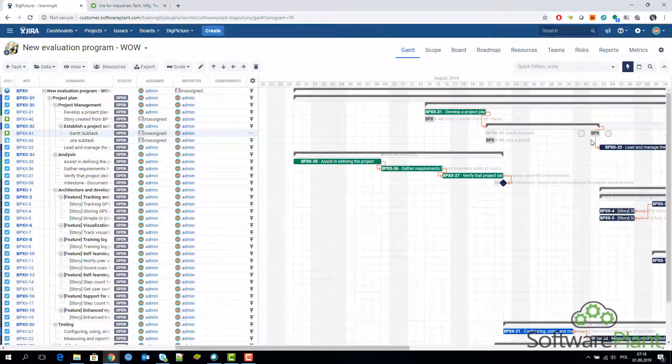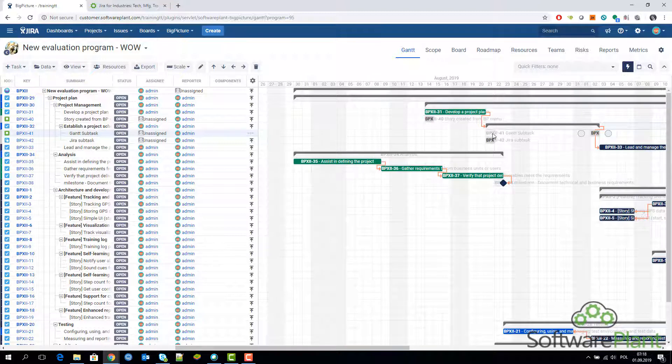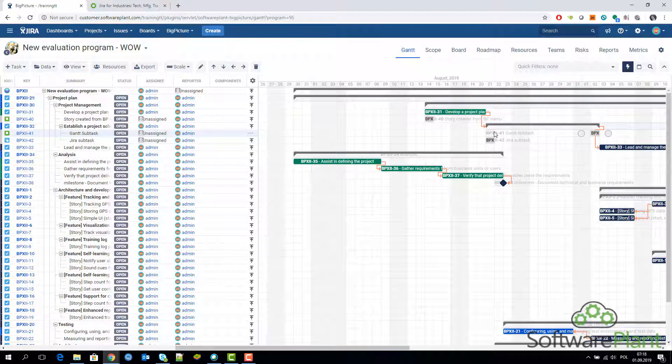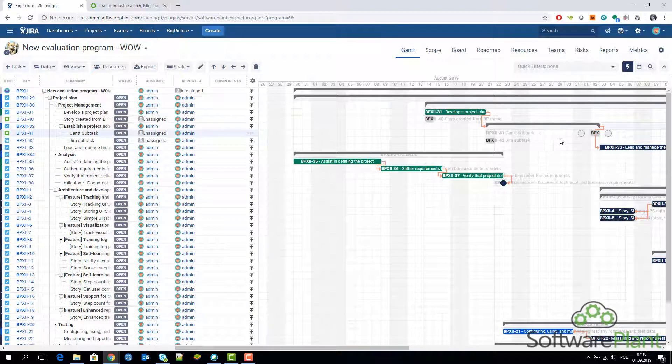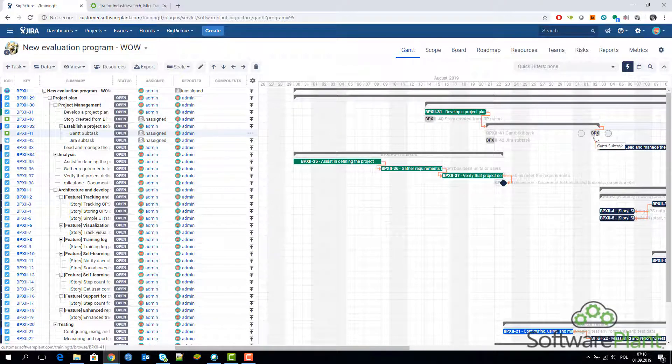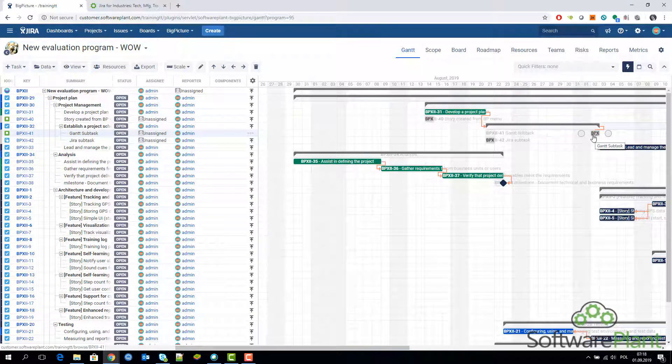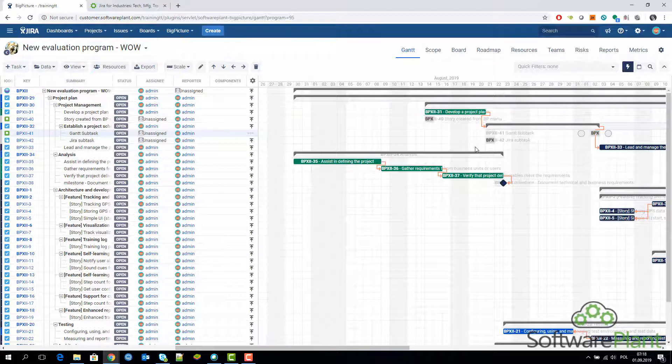These ghost issues, these transparent issues, are what your baseline is. Now if you move a task around like this, you will see that the ghost of the task stayed over here and you can see that while the baseline has been created, the task has been scheduled for 21st of August and now it's the 2nd of September.